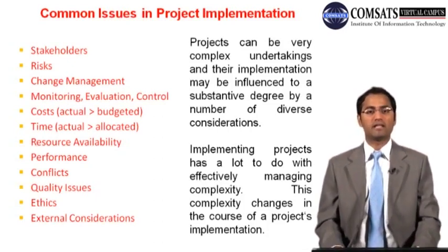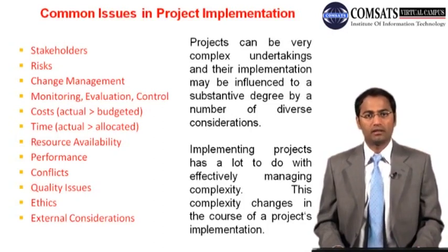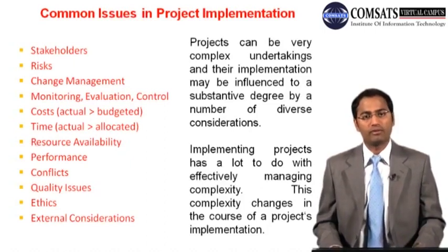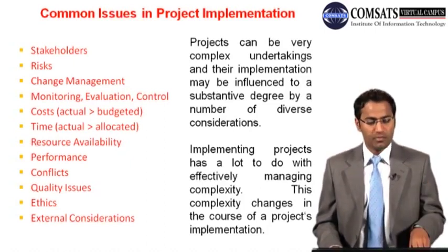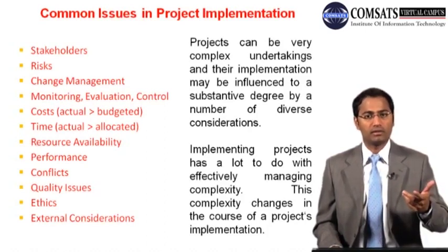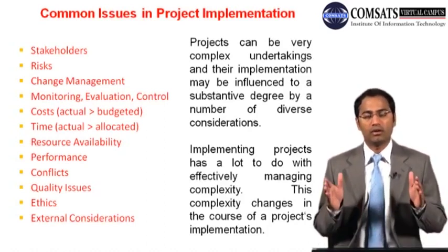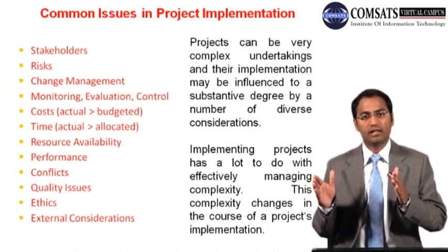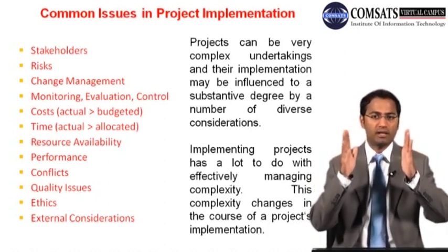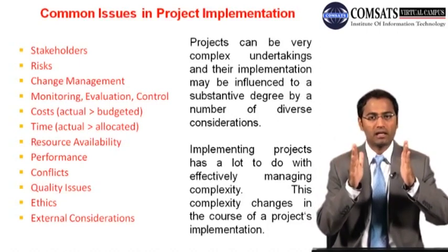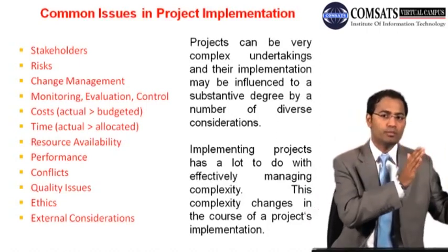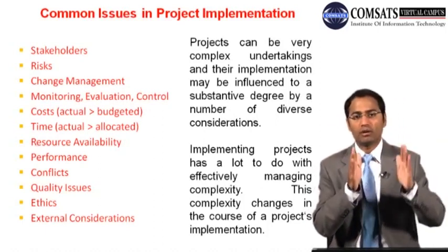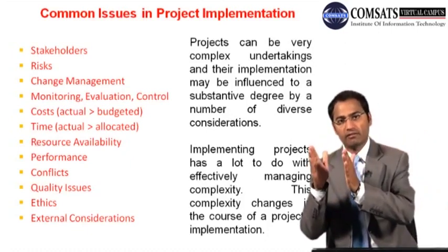And conflicts are inevitable wherever human beings are there, and personality conflicts are there. But the most important type of conflict is schedule conflict. So resources: you have assigned a resource, he or she will work in January, but the whole of the preceding activities has been delayed. The project activity on which you had planned to use Imran in January was dependent on two other activities, and those activities got delayed and finished at the start of February. So now you will bring the January activity to February,